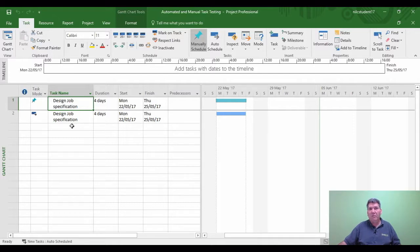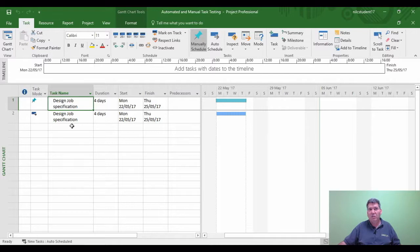What will happen in Microsoft Project is that if you ever want to use its automated features, they will bypass tasks that are manually scheduled. For example, the project start date, which is an automated feature, will not drive a manual schedule task.